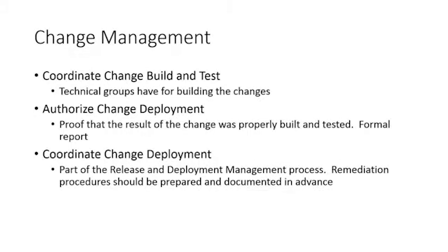So we can coordinate the change, build it, and test it. Now, technical groups have a role in building this change, and we'll have these groups together, our dev team that we're going to talk about in a little bit. We'll authorize it and coordinate the change deployment. So in authorizing it, we're going to prove that the result of the change was properly built and tested, and then have a formal report that says, yes, we've done this, we're authorized, we're good to go.